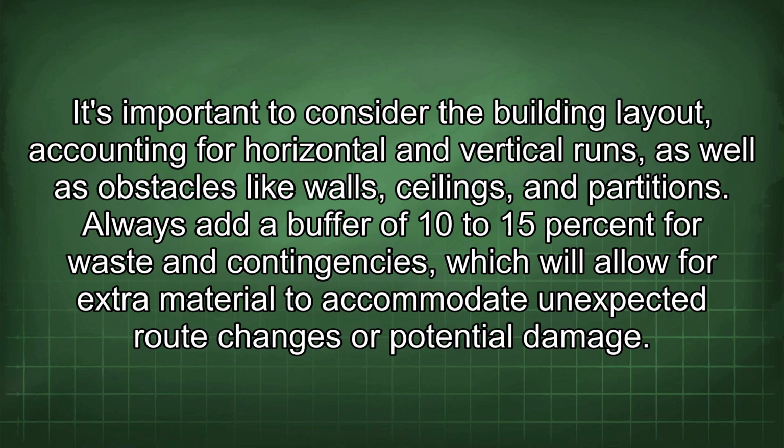and partitions. Always add a buffer of 10 to 15% for waste and contingencies, which will allow for extra material to accommodate unexpected route changes or potential damage.